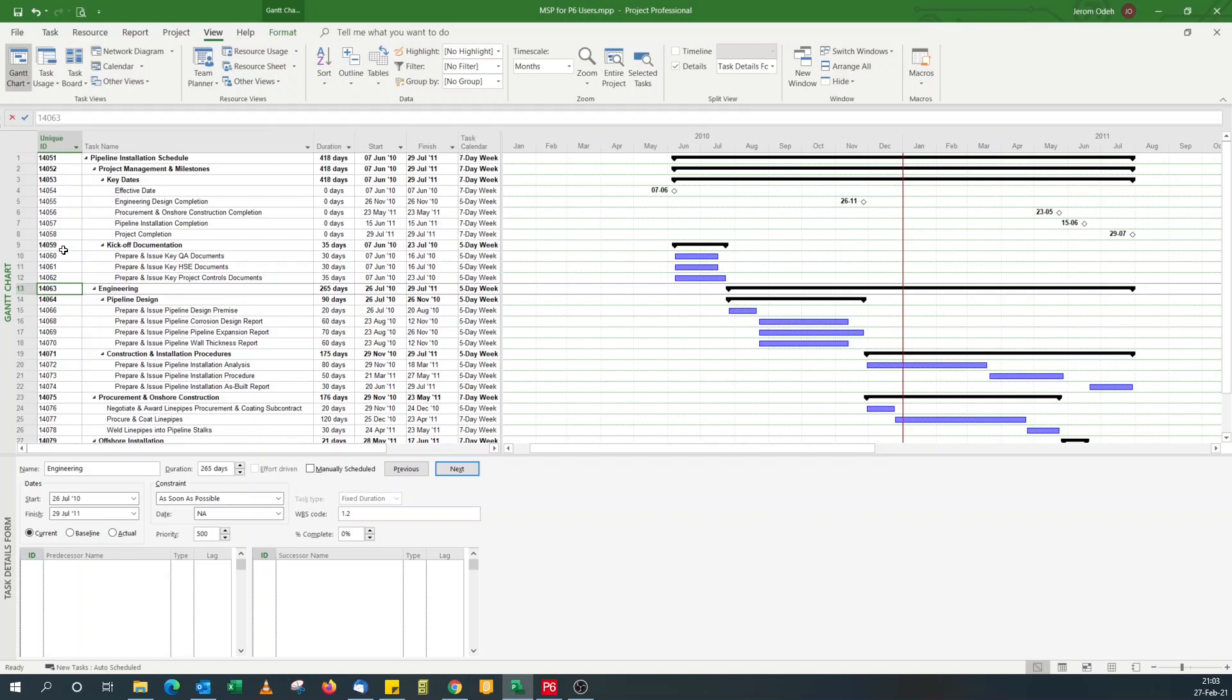So while in P6 the IDs are user generated, here it's system generated. So it's auto numbered. You can't change them. Well, technically you can't change the numbering. So it increases by one.